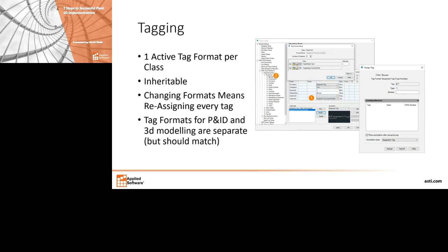So it's really just in the best interest to nail down your tag formats up front so that the people entering the data just have to do it one time and you're not going to miss a project deadline by having to go back and retag everything the day that the drawings have to go out.